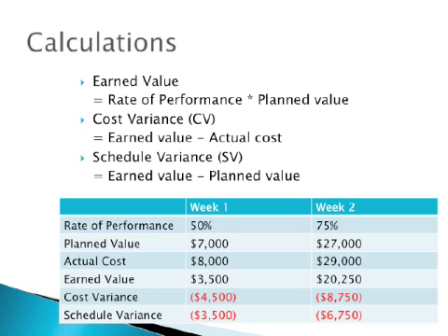The cost variance is calculated by taking the earned value minus the actual cost. Since the cost variance is negative here, it indicates that the work is costing more to do than what was planned. The schedule variance is calculated by taking the earned value minus the planned value. The negative number here indicates that it took longer than planned to actually perform the work.